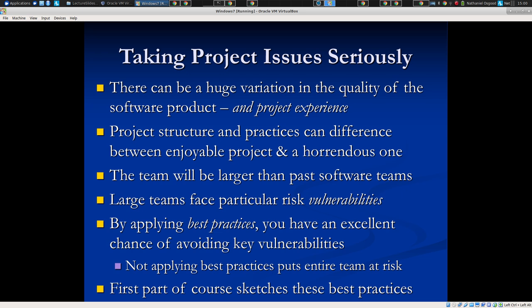If you have one person who's the build person, the build master, you have a low bus number. What do I mean by bus number, anyone? It means the number of people that have to be hit by a bus for the project to crash. It's a term you'll hear in companies worldwide. You have a low bus number, you will get in trouble.